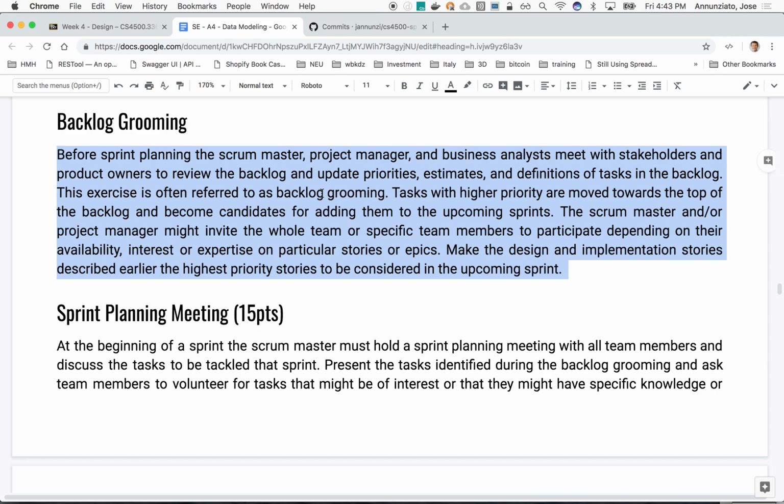We need a database before we have a service. We need a service before we have a client, and things like that. Yes, right. So they might decide on certain things that need to occur in a particular sequence. In this case, I'm playing that role, right? Deciding that yes, this is what I'm going to be working on next. But more and more, the team should feed into this and be part of that decision.